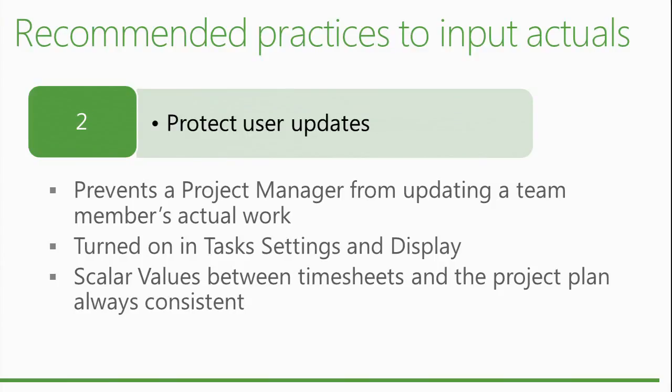What it will do for you, though, is when they enter 32 hours for the week on that timesheet, they're going to get 32 for the week. It's just that it may not be 8, 4, 6, 4, 8. It may distribute it. Yes, but you still get the 32. Yes, it will, but sometimes the distribution is a little different than what you were expecting.